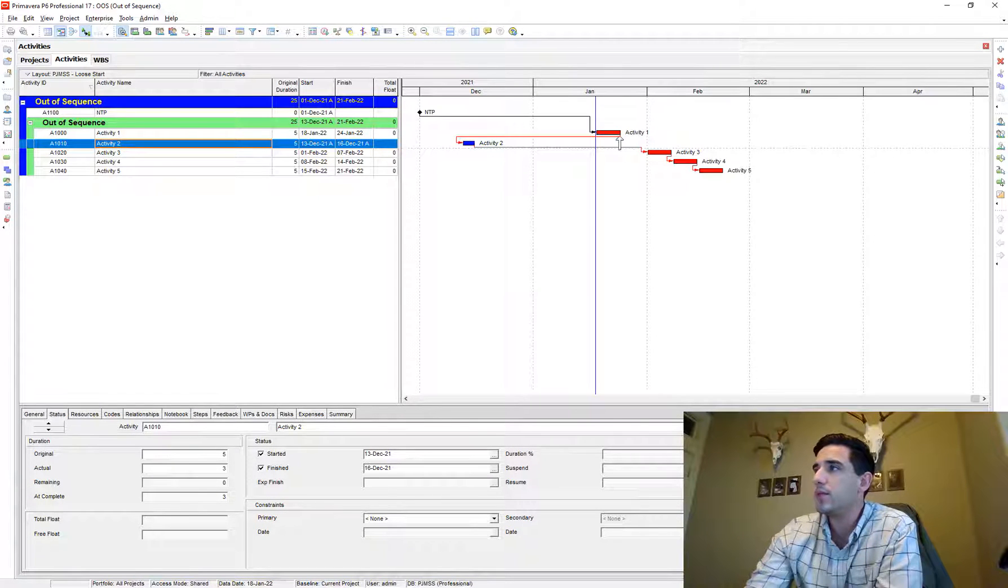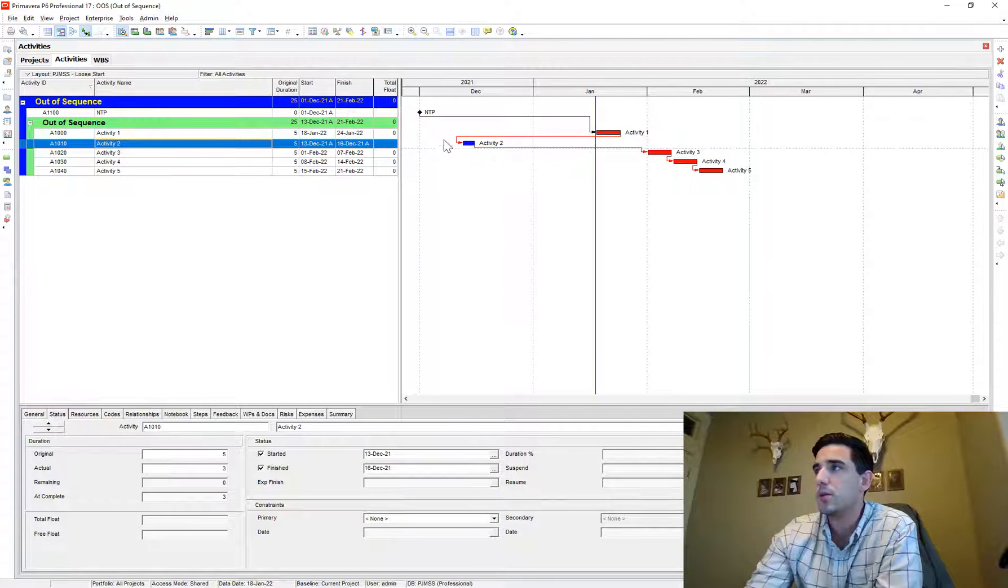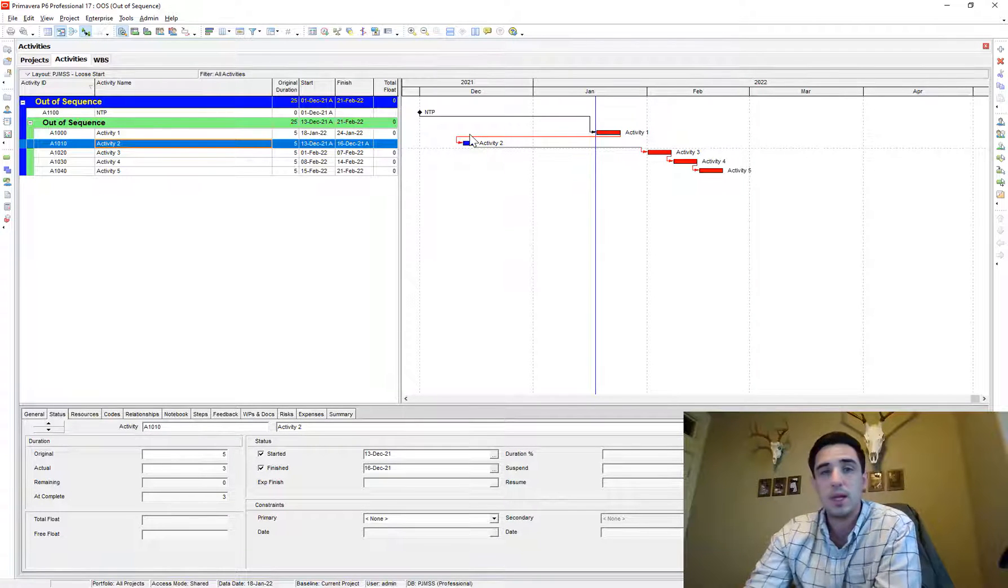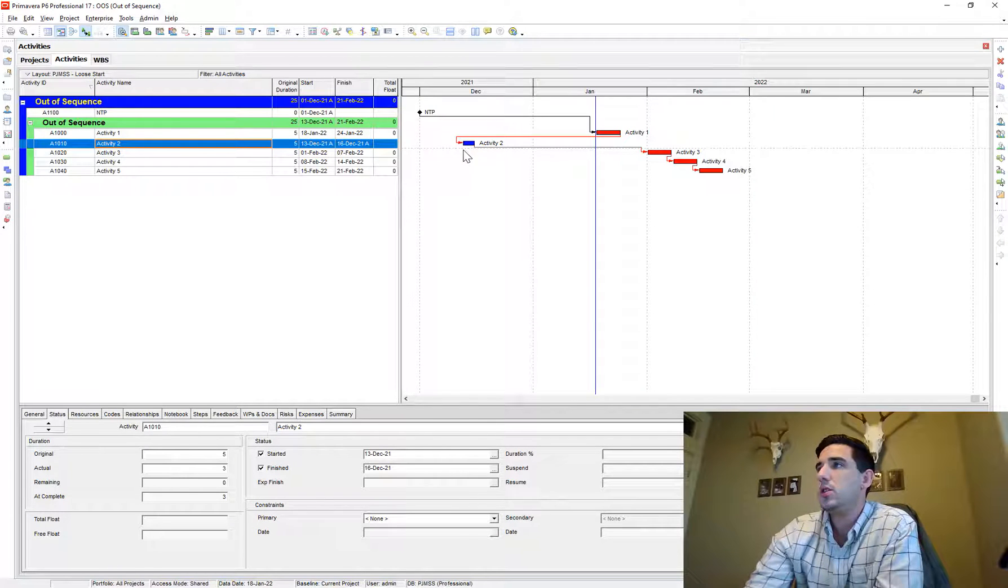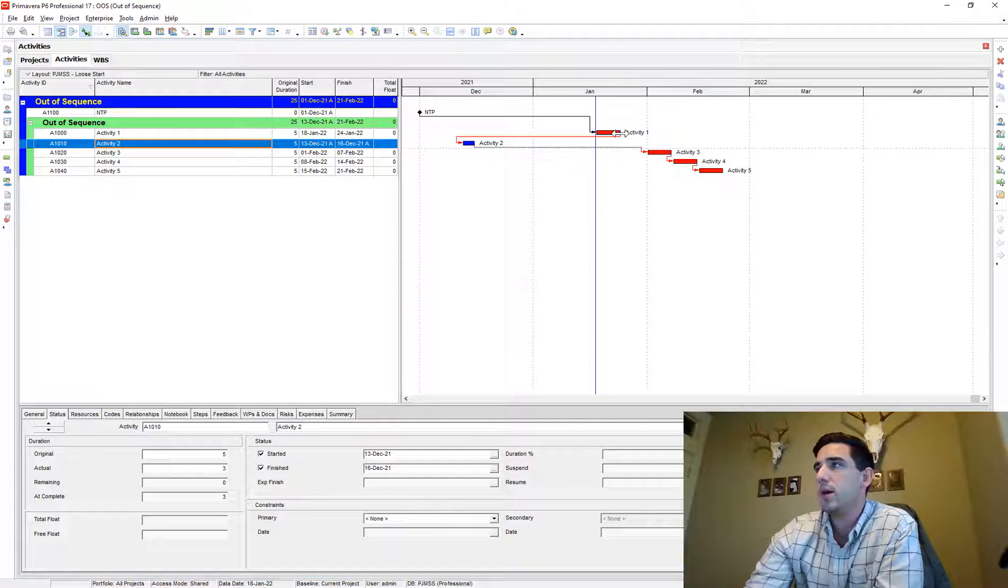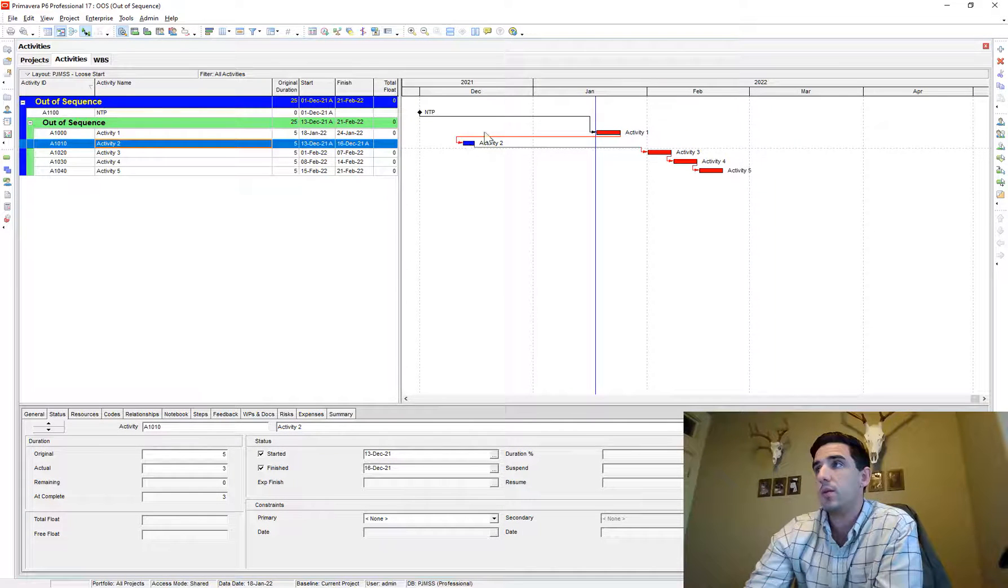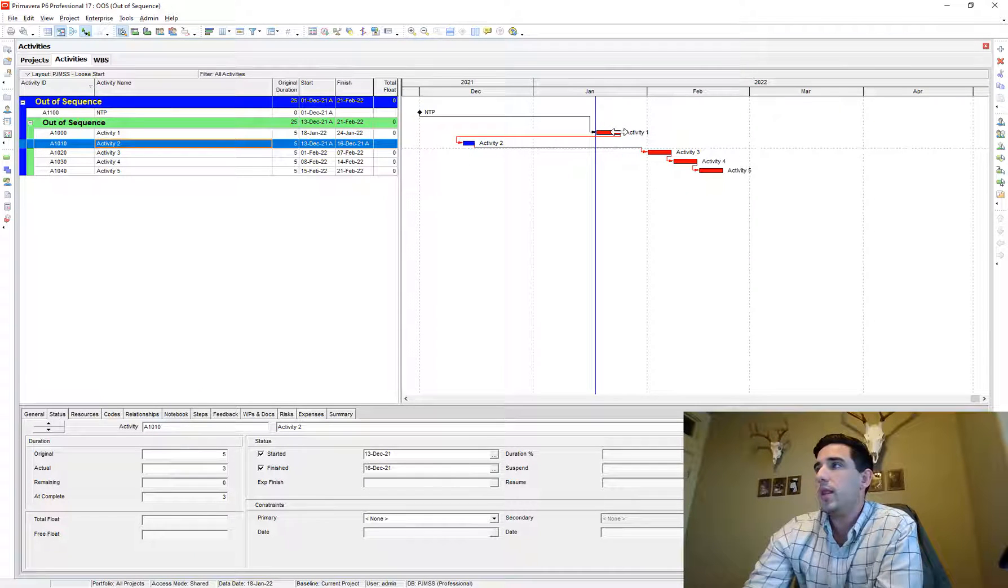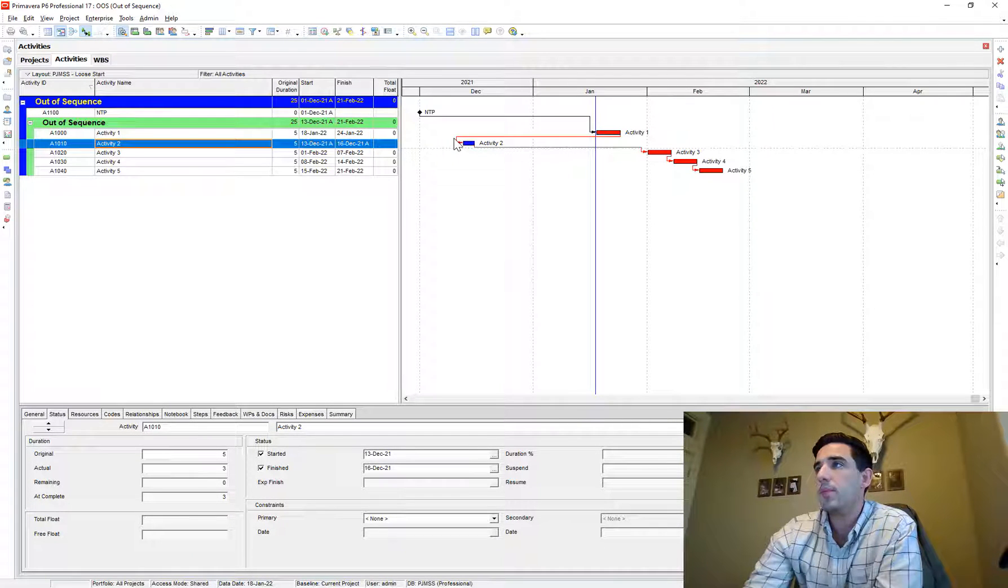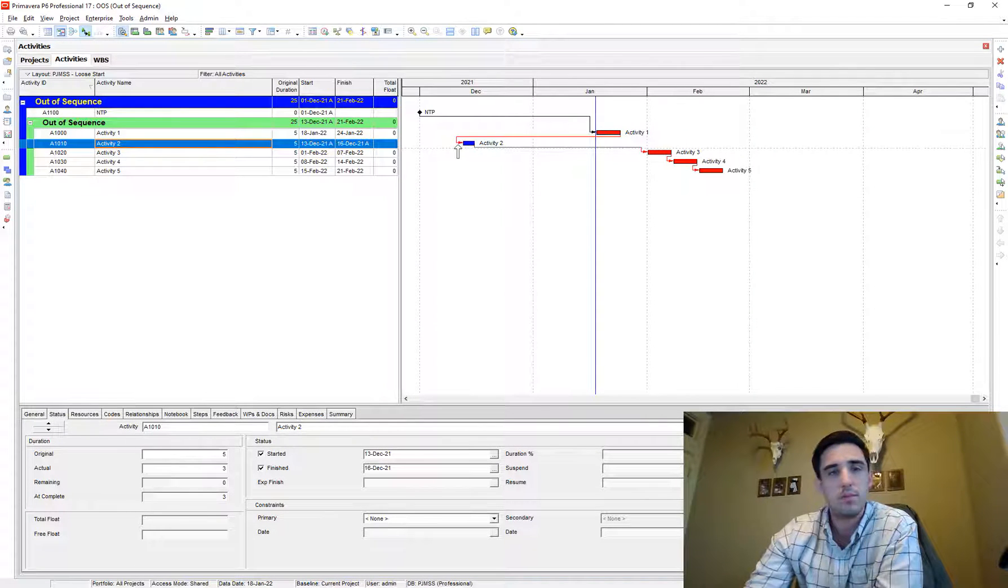Well, this red line here, this relationship doesn't make sense. It's not logical because according to how we've tied the schedule in, activity two shouldn't be able to start until activity one is finished and activity one hasn't finished yet. And yet we're showing activity two as finished. So therefore this is out of sequence progress and it should be corrected because this relationship appears to not make sense.